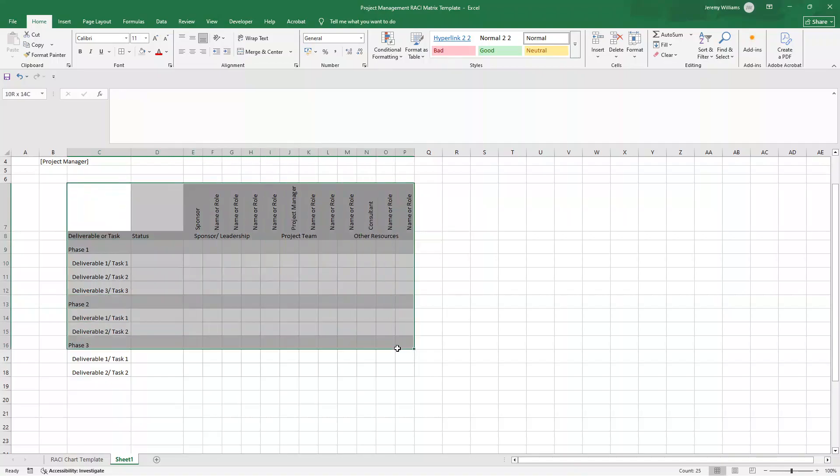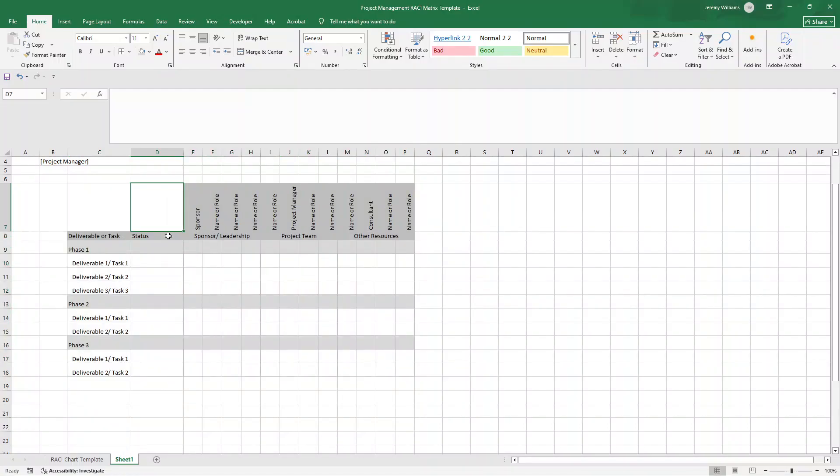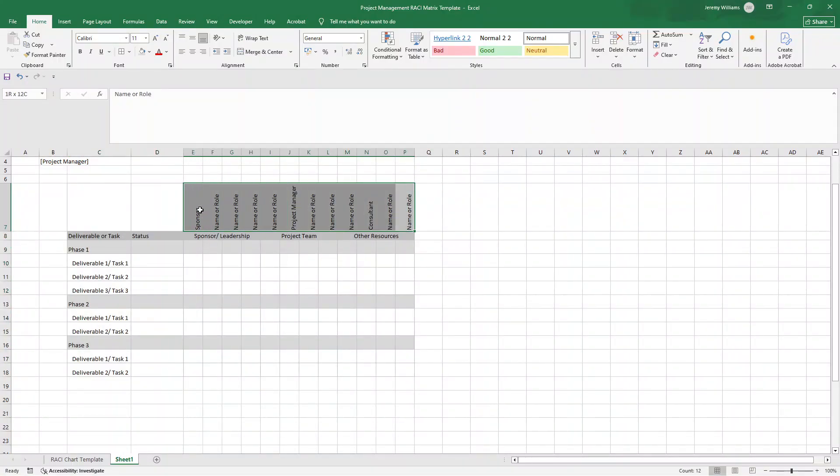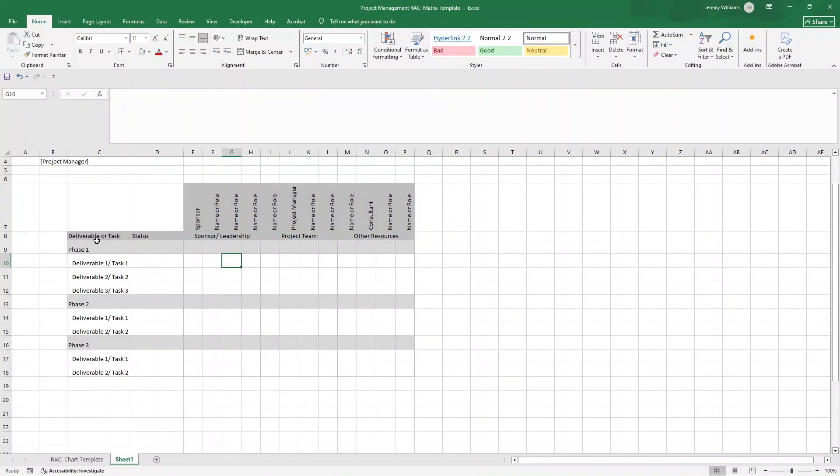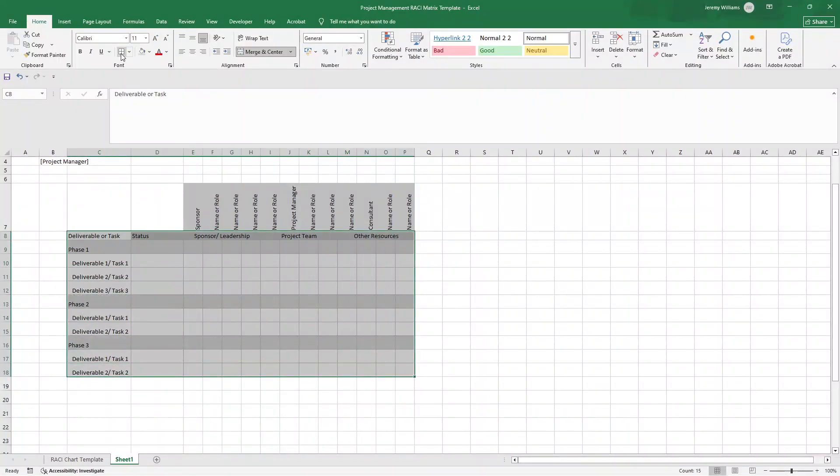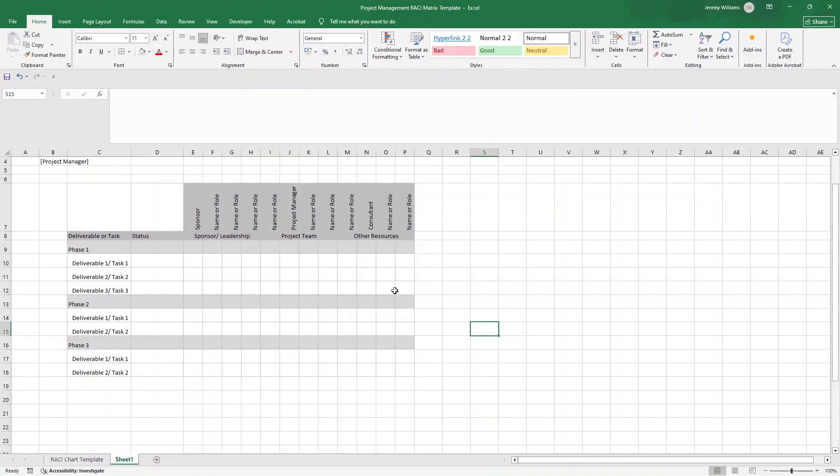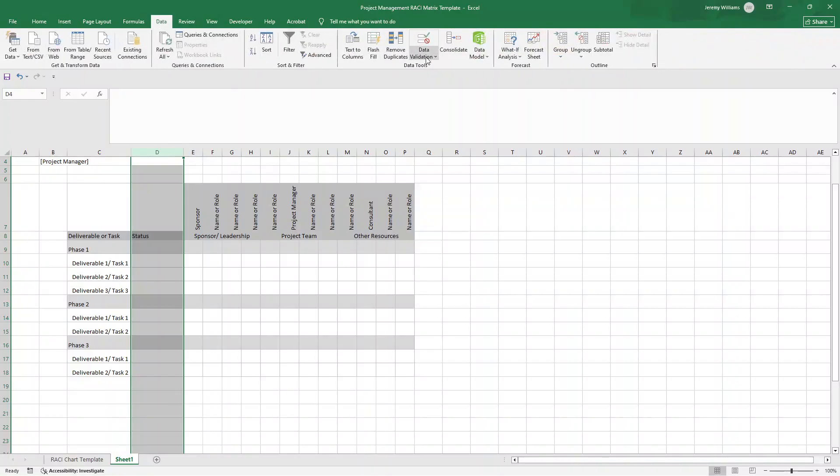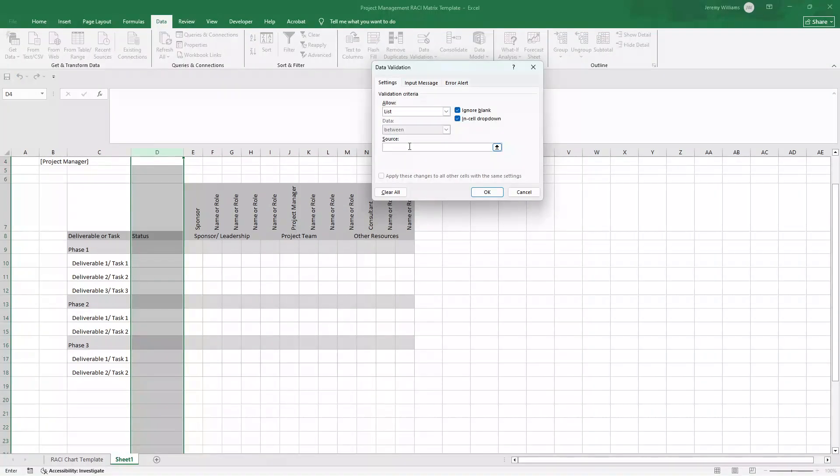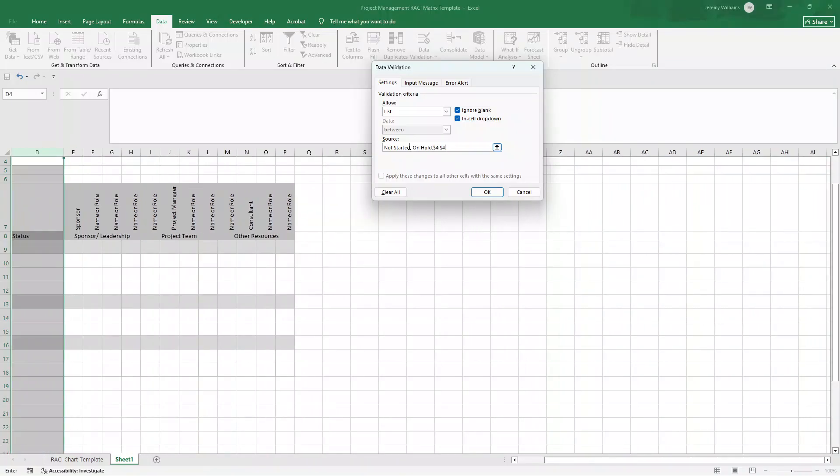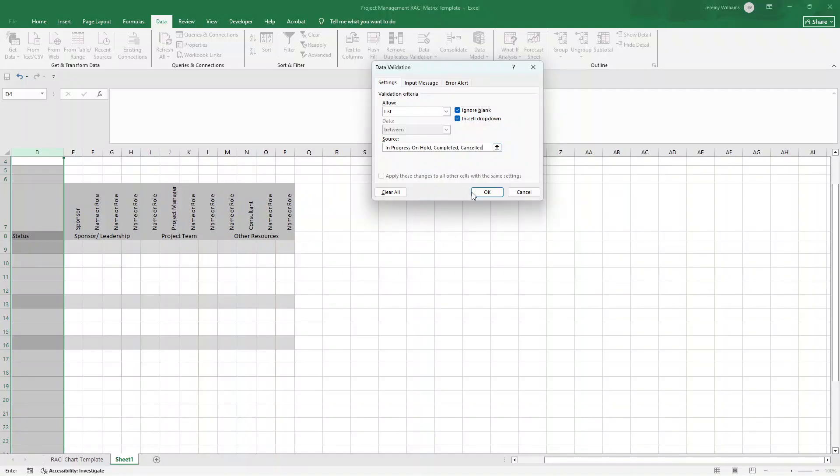Now, let's set up the status column. I'm actually going to put all borders around this for now. So from C7 through to C18, have we got our all borders on? Yes, we do. Let's put some borders around this. I just want to make it more distinct. Let's go there. I think it's the color of my border. Yes, let's go put that a bit darker. Let's put that a bit darker and it would be a bit more clear. Now, what we're going to want to do in the status is I'm going to select column D and I'm going to click on data. I'm going to select data validation, data validation. And in the allow, I'm going to change this to list. And then in the source, we're going to put not started on hold. No, let's just go in progress first. In progress, that's more logical. On hold, completed. And we'll put in cancelled as well because it could be that an activity or task is no longer required. So press OK.